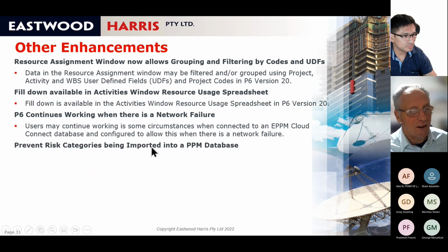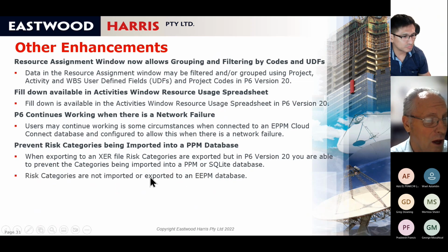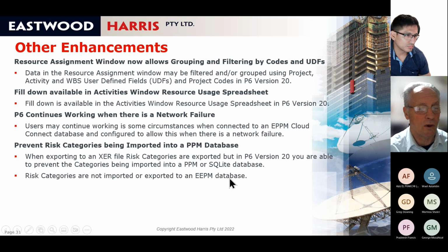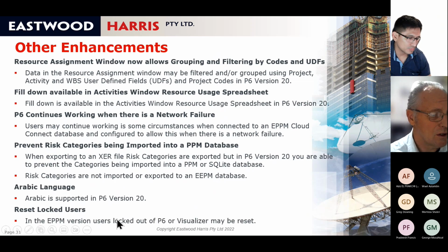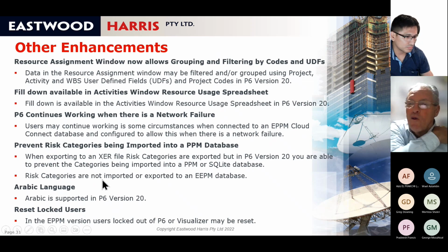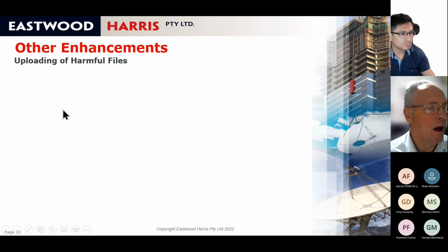You can prevent risk categories being imported into a PPM database. So when you export an XER, you've got a new box to say you don't want to import them. Risk categories are not imported or exported into an EPPM database anyway. It's now got support for Arabic. You can reset locked users. So in the EPPM version, if users are locked out of P6 or Visualizer, you can reset them easily, whereas before you had to wait for 15 minutes or so.